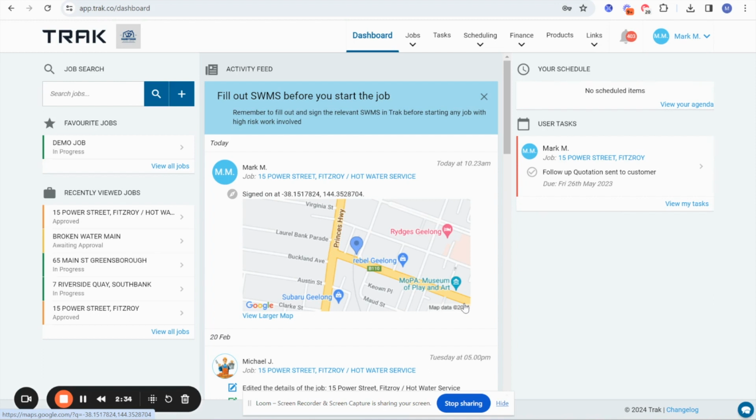Then you've got the last component where I see a lot of sub jobs being used, which is variations on a project. Lots of businesses will price a job, they'll go to the job, and then a large variation will pop up that might go for several days. You might have multiple hours against it, multiple expenses, costs, photos, quality assurance that you need to manage within the system, and then you'll invoice it when it's complete.